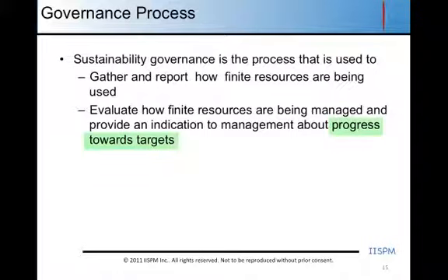So depending on the type of project, you'll report governance monthly, bi-weekly, potentially weekly. The longer the duration of the project, the greater the span of time between governance reports will be. If your project is going to be lasting 2 years, there's very little sense in adding the administrative overhead to report governance on that project every couple of weeks. A monthly reporting cycle would be sufficient to allow management control.